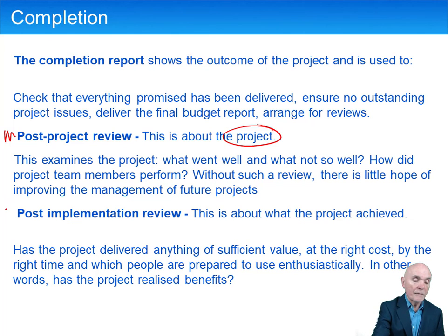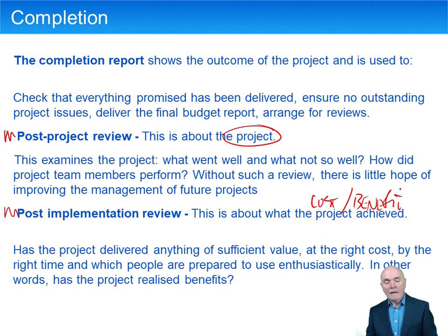And then there is what's called the post-implementation review. And this is really almost going back to the cost-benefit analysis. We could have had a perfectly run project in terms of hitting the scope, hitting the deadline, hitting the budget. But actually, even though we did it kind of perfectly, it's all been a waste of money because the promised benefits haven't materialized from that. So if we'd had our time over again, we'd simply not want to do the project.